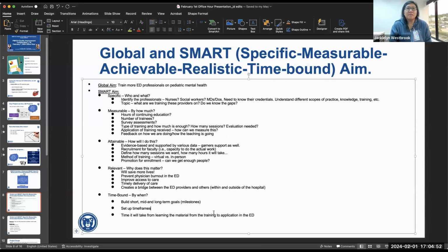Something that may be experienced across the board, but specifically for us out here in the Pacific, we have to include the window of time that it takes to just complete the research portion, procurement portion, contract portion, and then determining time zones for our providers because we are on the opposite end of the time zone.